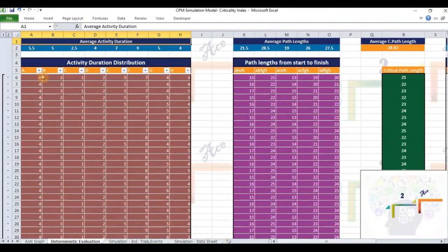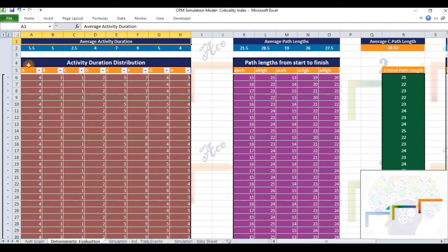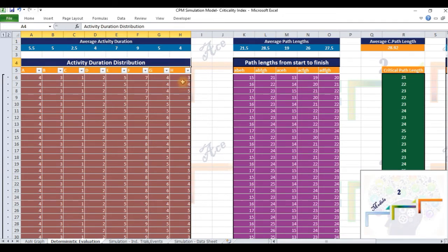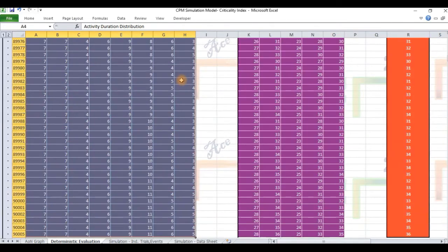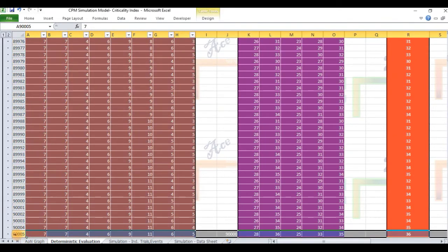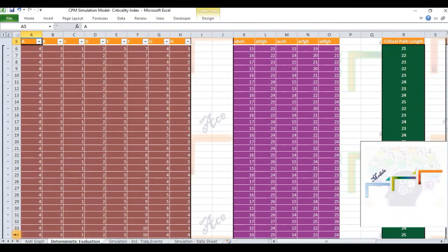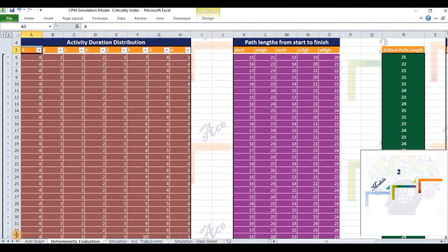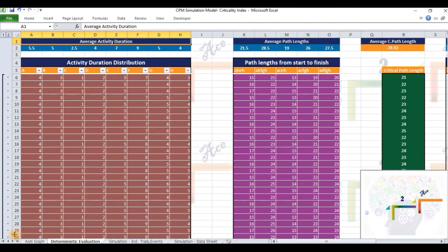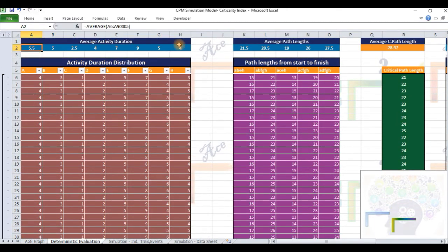The first table on the extreme left-hand section of the tab titled Deterministic Evaluation contains the exhaustive set of all the 90,000 possible combinations of durations of activities A through H. Row 2, columns A through H give the population mean of these activity durations.